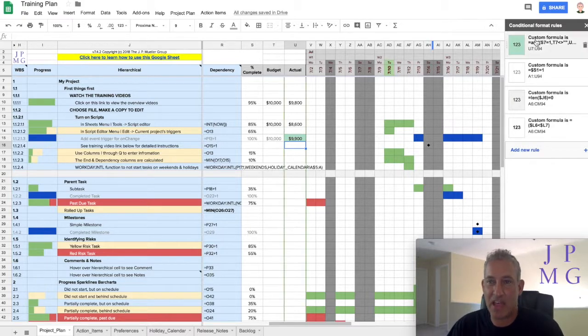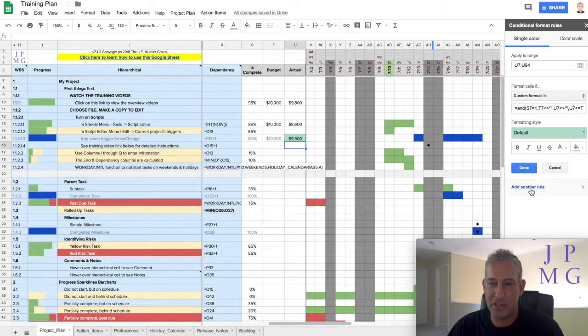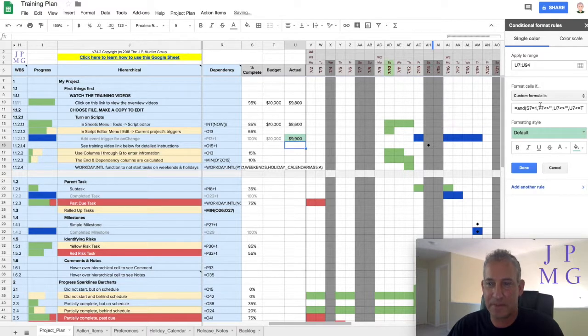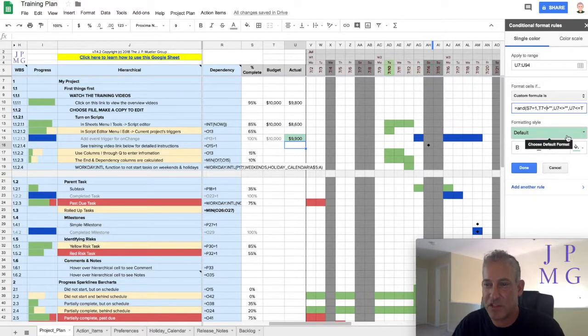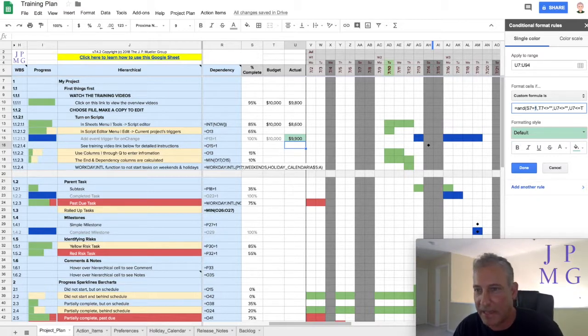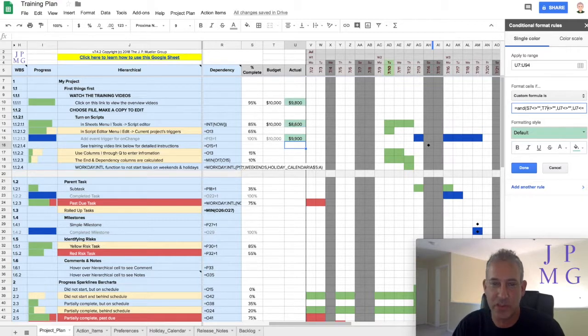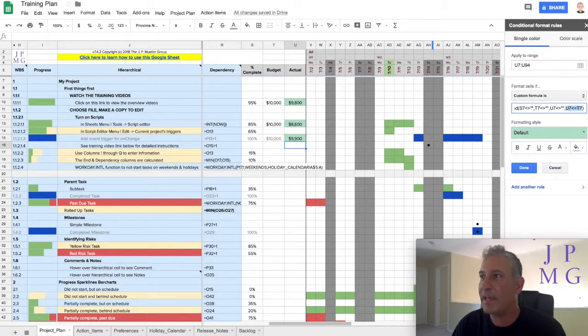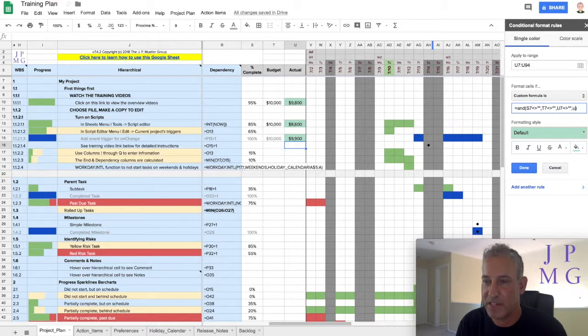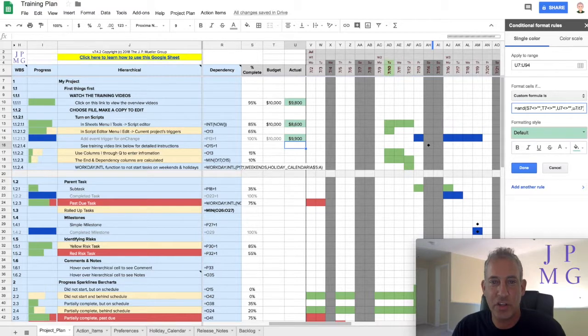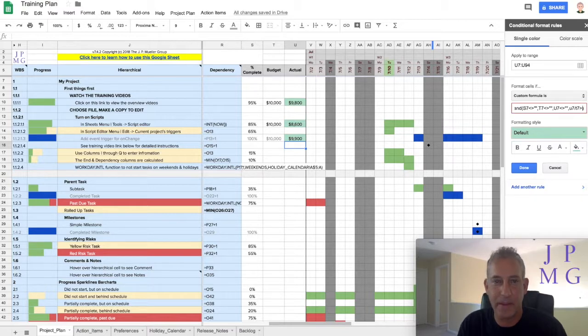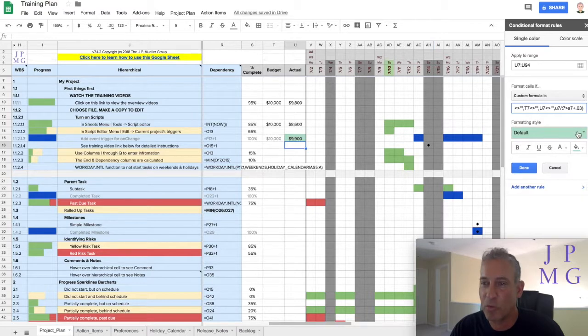The next test, let's make our red test, meaning I'm over 3%. So first I'm going to highlight the green one, because it's much easier to edit from an already existing formula. I'm going to add another rule. It's going to make a complete copy of it. And in this case, I'm going to change, I want to look, I don't care that it's equal to one. I'm going to say that it's not blank. Okay, just like the other ones. So as long as I have a value in all three, and my rule here is going to be that U7 divided by T7, which is budget, or actual divided by budget, is greater than S7 plus 0.03.